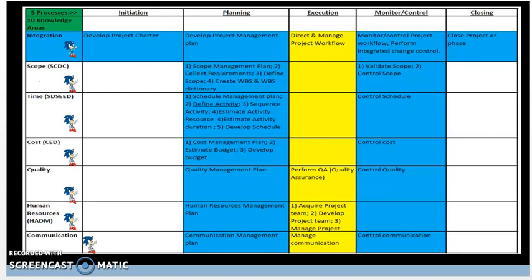Typically, at this stage of scope planning, change requests are usually frowned upon after a baseline is established. If too many changes are made, this can contribute to risks such as schedule delays, overstepping the budget, overworking the project team's resources, and not meeting the voice of the customer requirements, resulting in customer dissatisfaction.